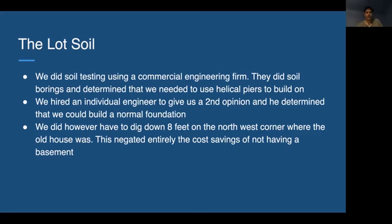Well, I think part of the process that didn't happen early on was identifying the soil profile. Once we found out what was going on below grade, the past owners of that site had basically dumped garbage soil back in over the top of the old foundation. So we ended up digging down several stepped footings to get to virgin soil to build on. We also ended up connecting with whatever old pipe had gone into the sewer system, so we sent one of those little mechanical robots in to prove that we could still connect to the sewer.